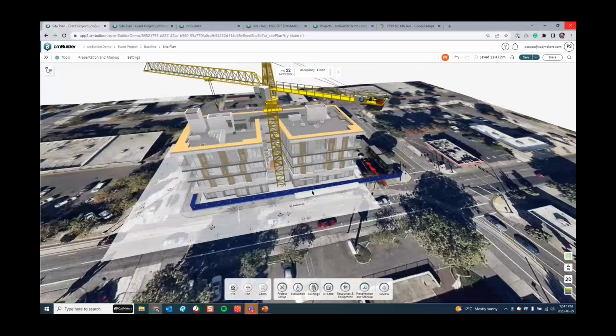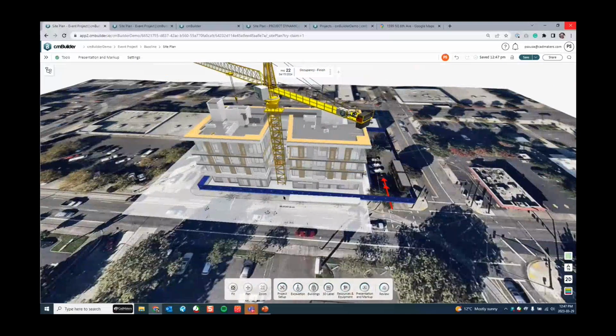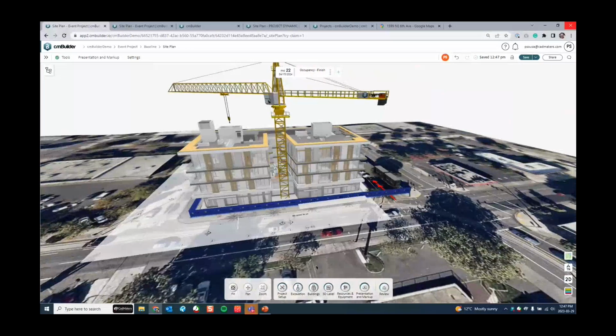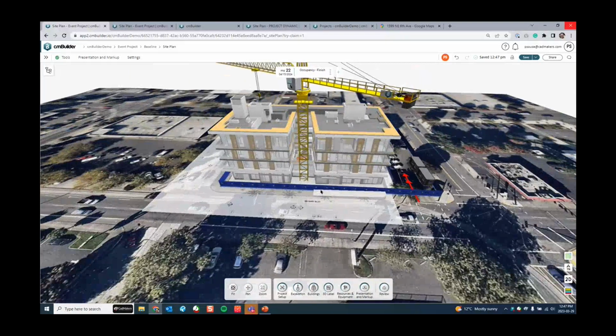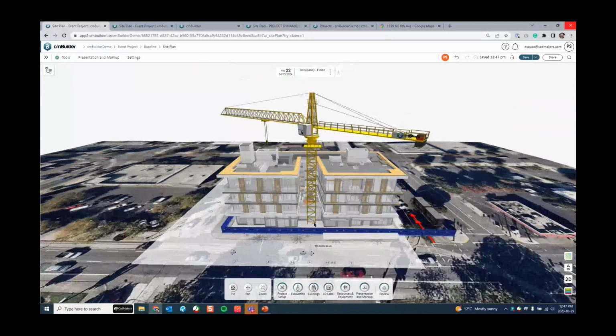Similar to what I've done for a lot of you in demos, you would start with the same kind of sequence of the model, and then start applying your site logistics planning. You know, if you need traffic management, all the different phases of the construction, and just link those to milestones as well. And so just say, hey, crane shows up on the crane mobilization milestone, and it leaves on the crane demob, right? The same idea. Yeah. And it'll stay everything in between.